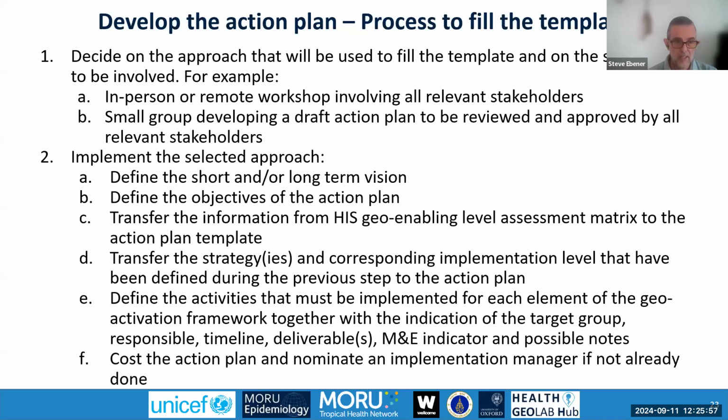And then last but not least, which is not necessarily an easy exercise, but of course a very important one, to cost the action plan, right? And to nominate someone in charge of the implementation of that plan if this is not already being done. The whole idea here is at the end, you have a comprehensive document that you can use to present directly to potential donors.